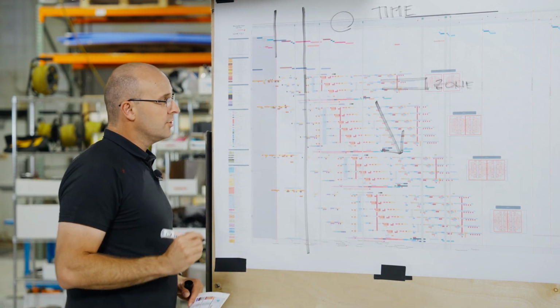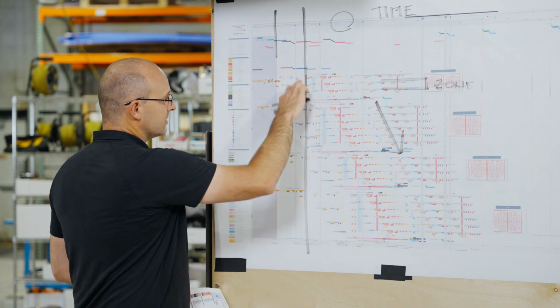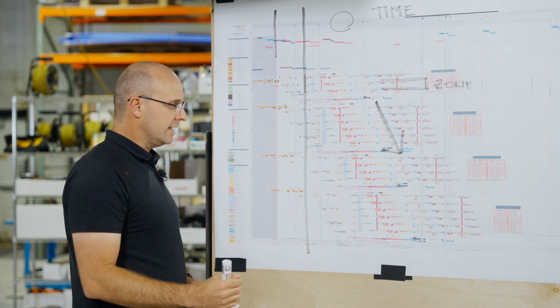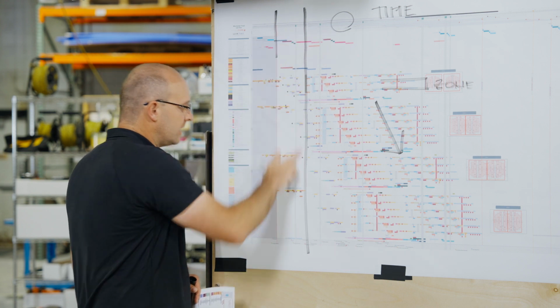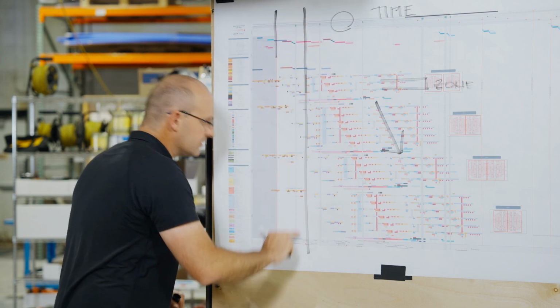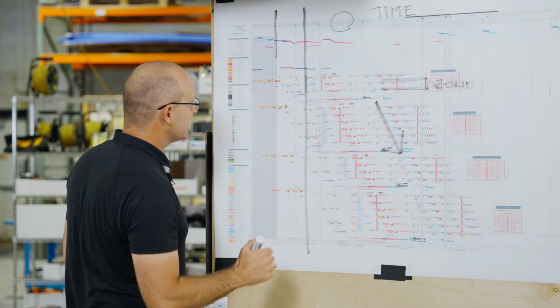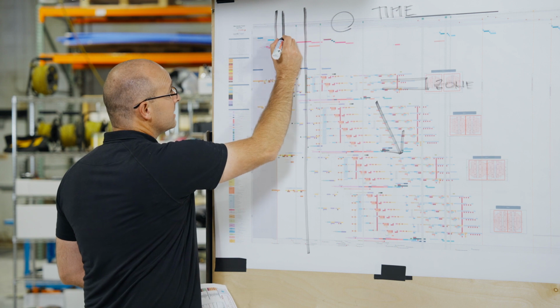So when you're looking at this with your trade partners, you're looking at these activities and asking them, are they ready? What is missing? Are there any roadblocks? Are we ready through here, and are our materials and information aligned to those dates? If the answer is yes, then you have done that part of your Trade Partner Weekly Tactical.